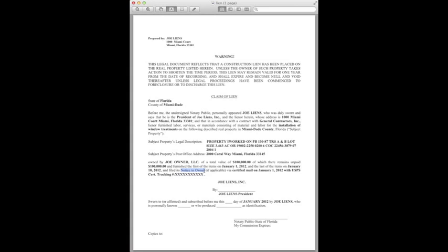And that is why it's important to place the date that you first furnished labor or services to the property on the lien itself. Now let's briefly discuss if your situation requires you to serve a notice to owner on the property owner.